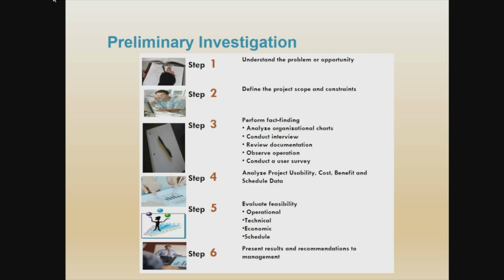Step 3, perform the fact finding. Fact finding: analyze the organization chart, do observation of the current activities, conduct interviews with the related persons, read and review the documentation, the manual, the vision of the company, maybe, and the schedule of the employees.